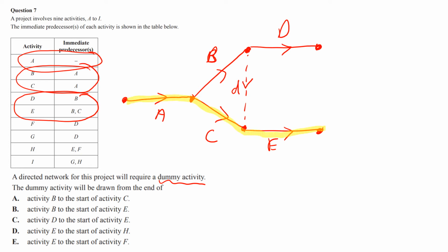So E going backwards from the arrow, backwards through there, backwards through there. You can see E has gone to C, but if we do another path, let's do it in green, E going backwards through the dummy, we can then go through B and through there. Remember, the dummy doesn't count on the precedence table. So dummies are not listed on the precedence table. Don't go saying the dummy is an immediate predecessor, because then you'll lose a mark. There's quite a possibility there.